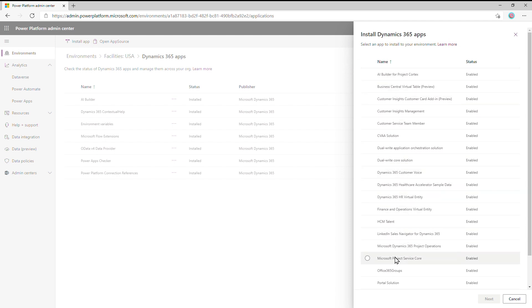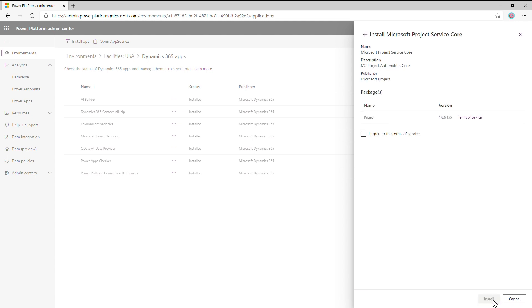Pressing that button gives us a menu with a list of applications that can be installed in this environment. Towards the bottom of this list, you'll see one that says Microsoft Project Service Core. Choose that and press Next. Review the Terms of Service and go ahead and press Install. This process will take about 45 minutes. When it's done, you can then go ahead and configure Project.